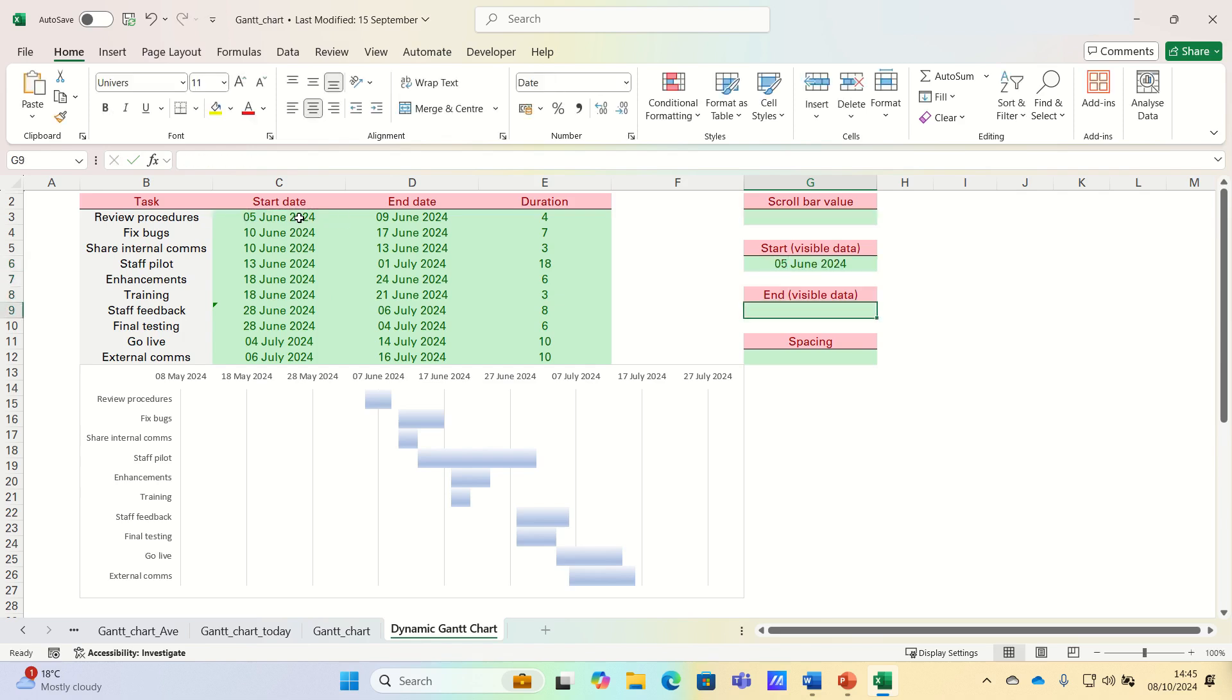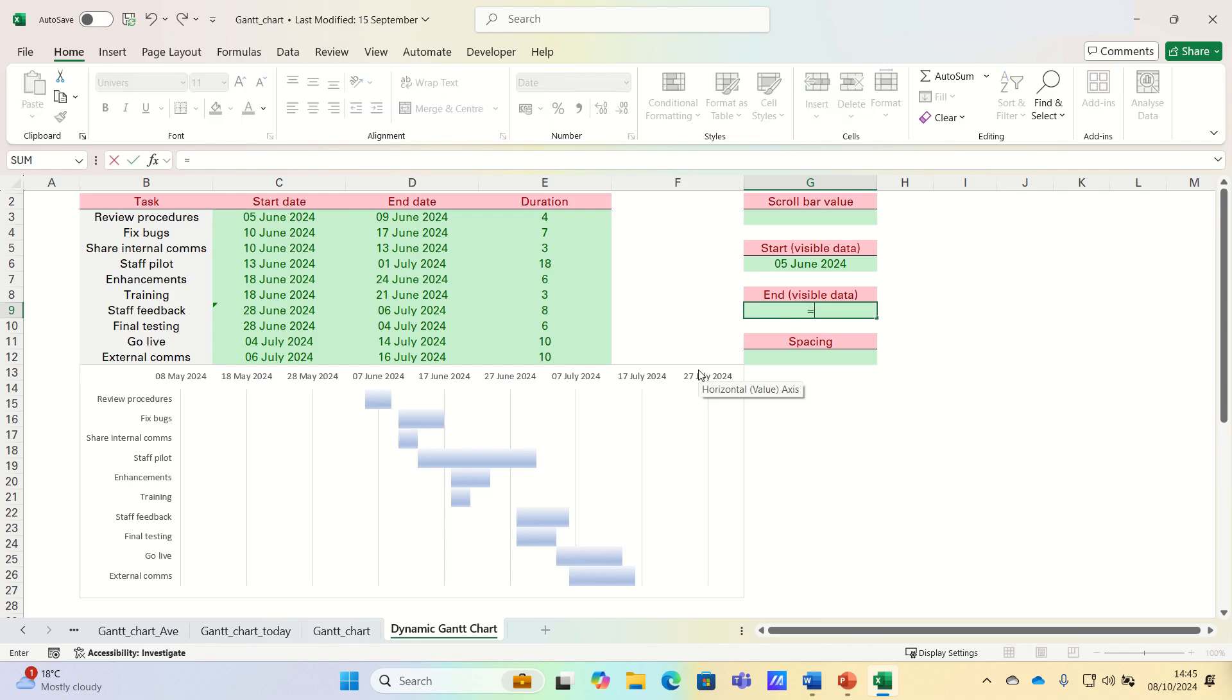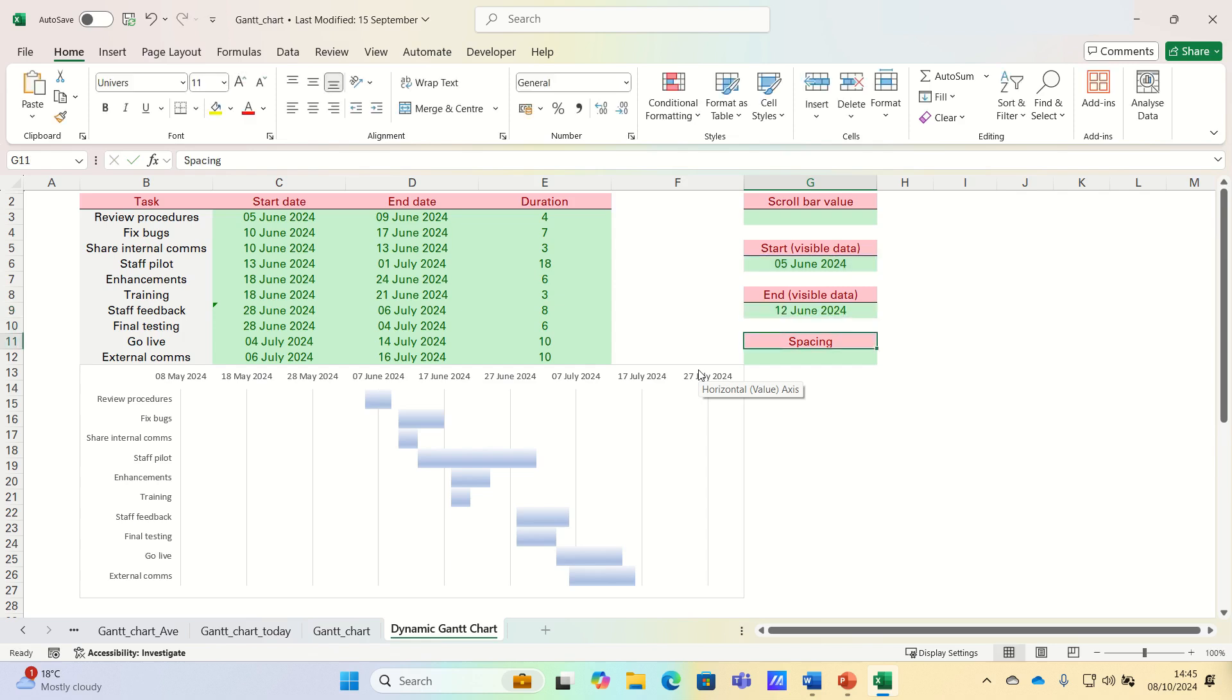The end date of the visible data is the latest date that appears on the horizontal axis of the Gantt chart. If we want to show 7 days at a time, this will be the start date plus 7.